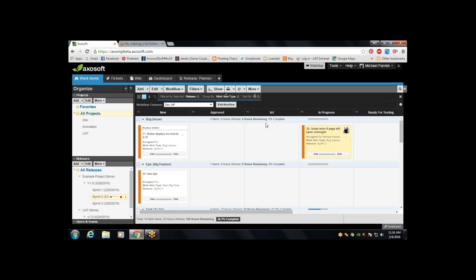And I was going to mention the notifications as well. It may be overkill, but you can set up a monitoring notification, just for your own sake, so that if an item comes into the system and it's been sitting in a certain state for too long, it notifies me, because this is probably going to be concerning if I keep it too long. This thing should have been moved to this step, should be in this status, it should be past this percentage complete. So you can create your own little service level monitor.